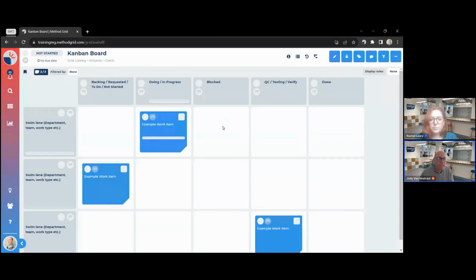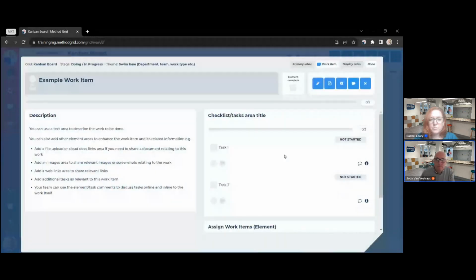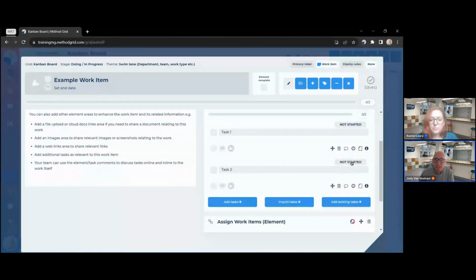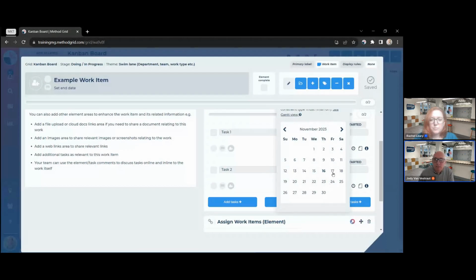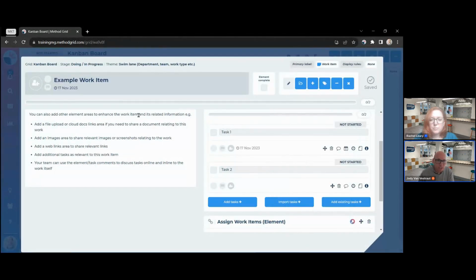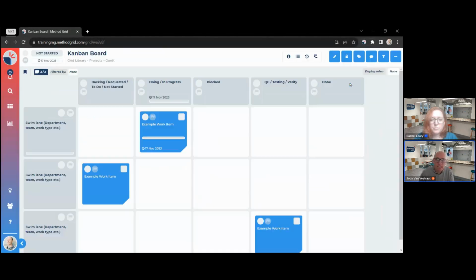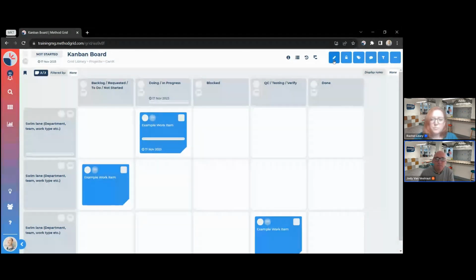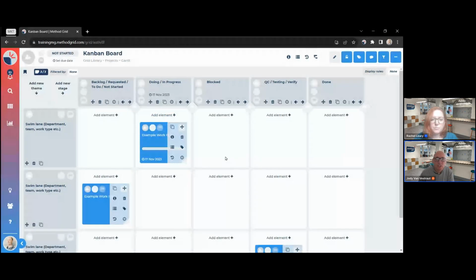I can just stick to adding end dates and it will allow you to do that. It will just put them into the Gantt with the must finish on constraint. So in here, I can give an end date of this task to perhaps tomorrow, and it will schedule that, and it's gone up the chain. So it's gone to the element, it's gone up to there. So anything with no children, I can schedule directly in the grid.